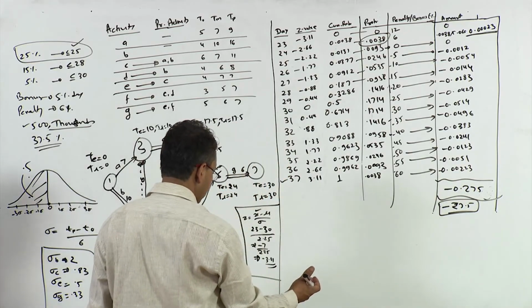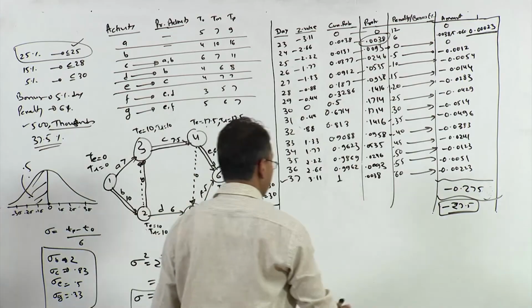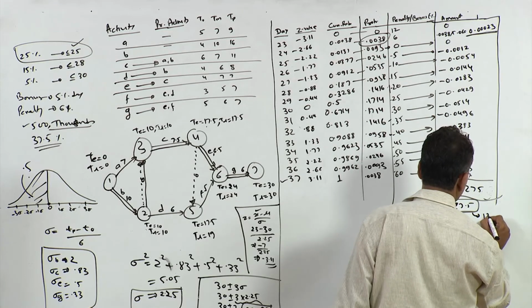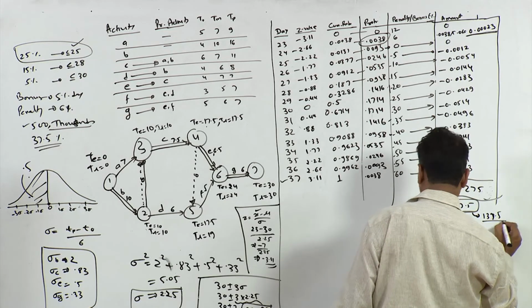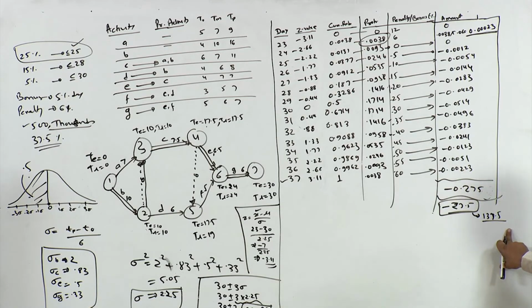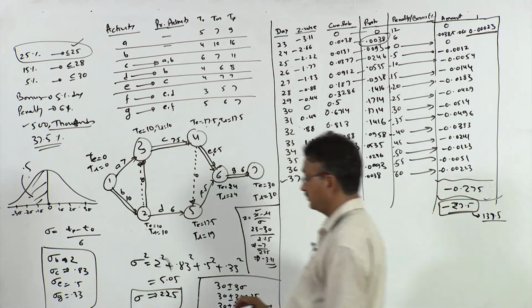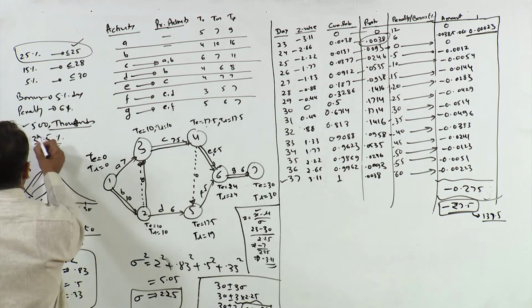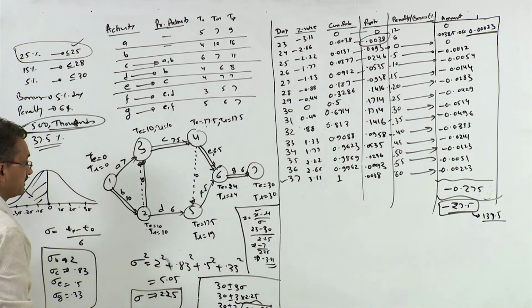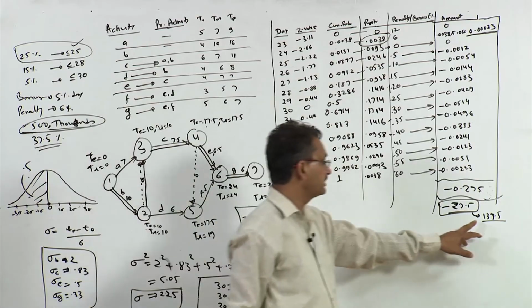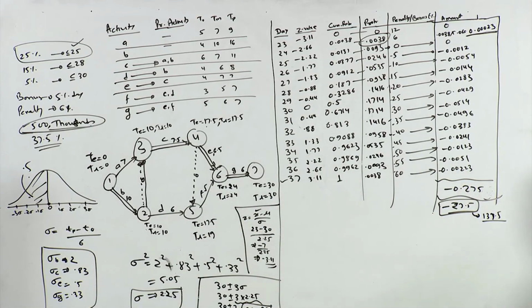In other words, this penalty is equal to 137.5 thousand rupees. How did we get this value? This is because our quote price is 500,000, and the penalty is 27.5%. So the total penalty is 137.5 thousand rupees.